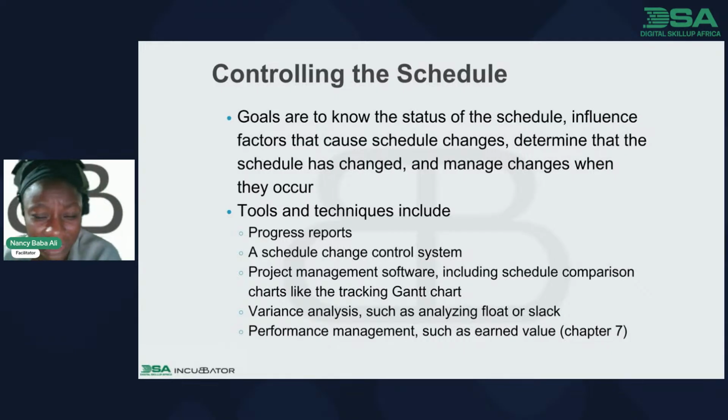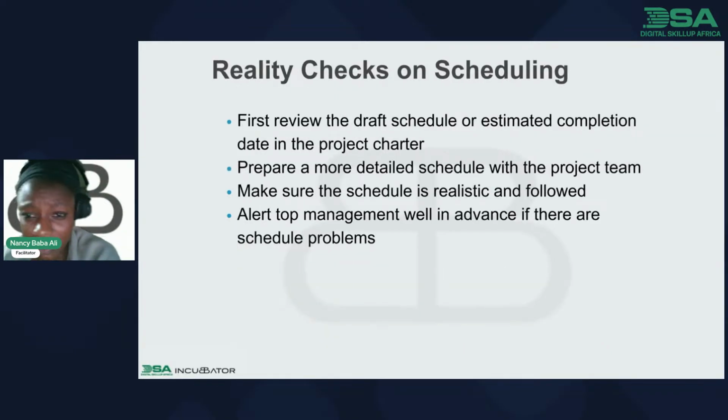And then we have reality checks on scheduling. First, review the draft schedule or estimated completion date in the project charter. Prepare a more detailed schedule with the project team. Make sure the schedule is realistic and followed. Alert top management well in advance if there are schedule problems.